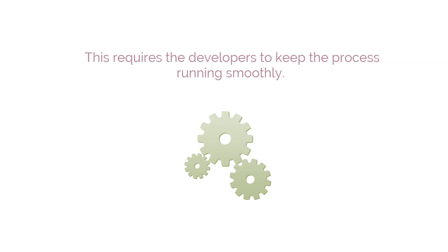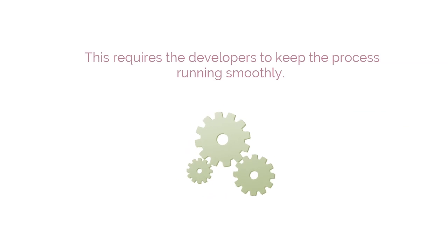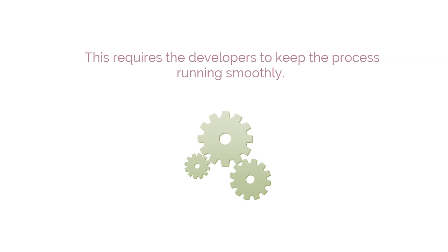This requires the developers to keep the process running smoothly. Allowing too many tasks to remain in WIP must be avoided. A new task can only be pulled when the worker finishes his or her current task. The next principle is managing workflow.